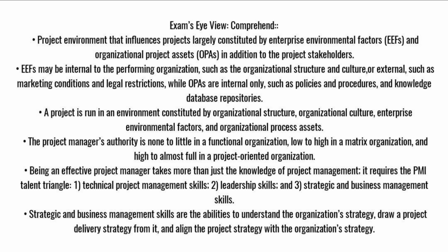A project is run in an environment constituted by organizational structure, organizational culture, enterprise environmental factors, and organizational process assets. The project manager's authority is none to little in a functional organization, low to high in a matrix organization, and high to almost full in a project-oriented organization.